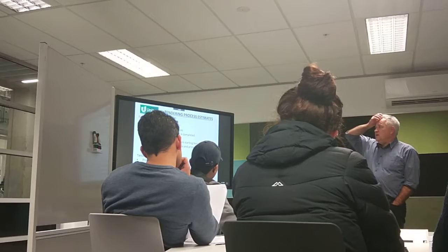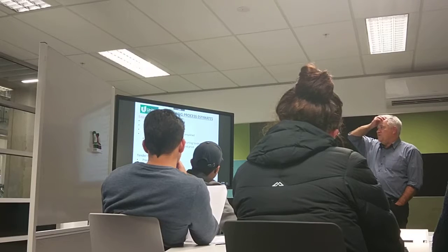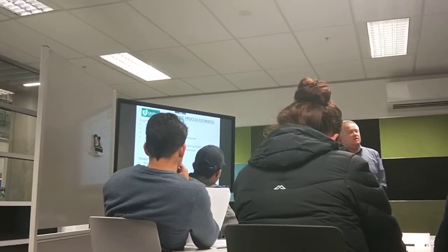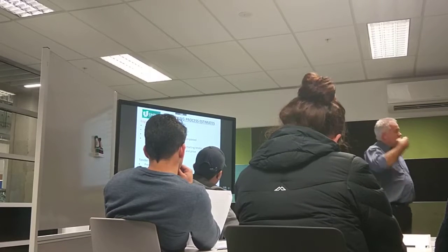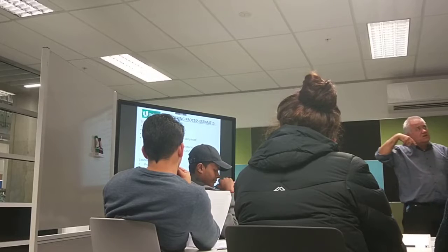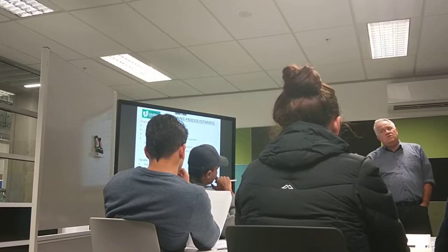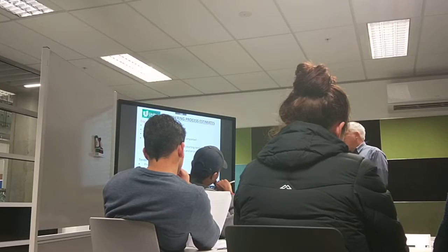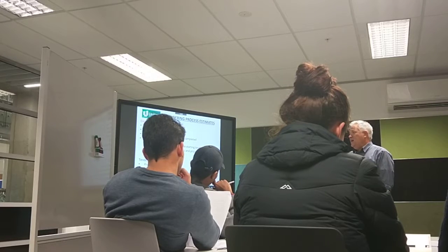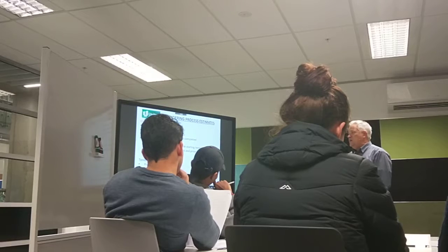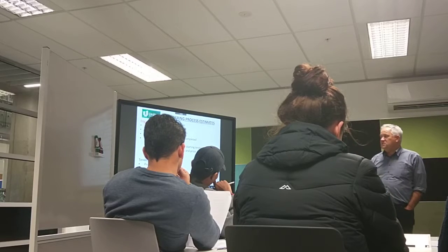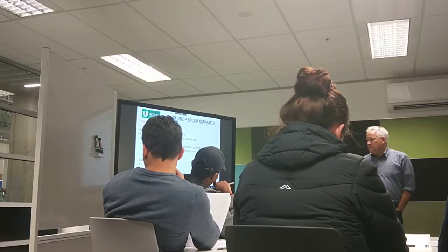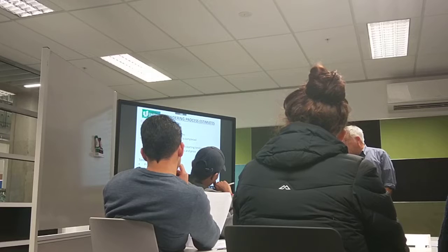So there is a summary. The engineer's estimate is produced by the consultant based on the final schedule of quantities, done when the tender document is completed. After you've done the tender document, when you've done the drawings, done the specifications, done the schedule of prices, then you do the engineer's estimate. It's used to provide an estimate before the tender starts, we go or no go, and afterwards, are we getting a fair price. The tender price is prepared by the contractor, based on the tender document, and submitted with the submission. We will do the work for this much, and it becomes the contract price if the tender is accepted.